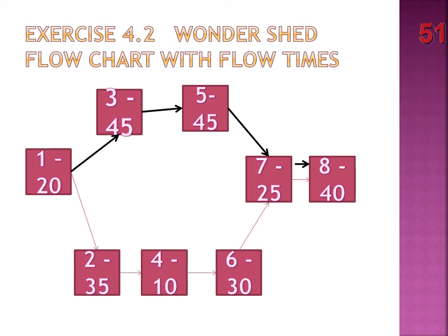Okay. So again, if we're trying to decrease flow time, you have to find the one that is the critical path, and that's where you play with it. And the opposite of that, if it's not the critical path and you add time to it, as long as it's not making it longer than the critical path, you've not changed the flow time of the process, right? So it was a little bit of a trick question.